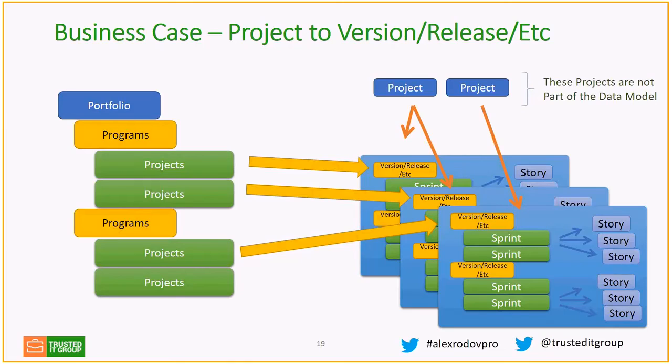And if you have a breakdown by sprint, by story, then you can break it down by story if you really want to get to that level in the PPM, which I don't recommend doing, and keep that level of granularity in the Agile tool. So that's how you translate the story points into hours.